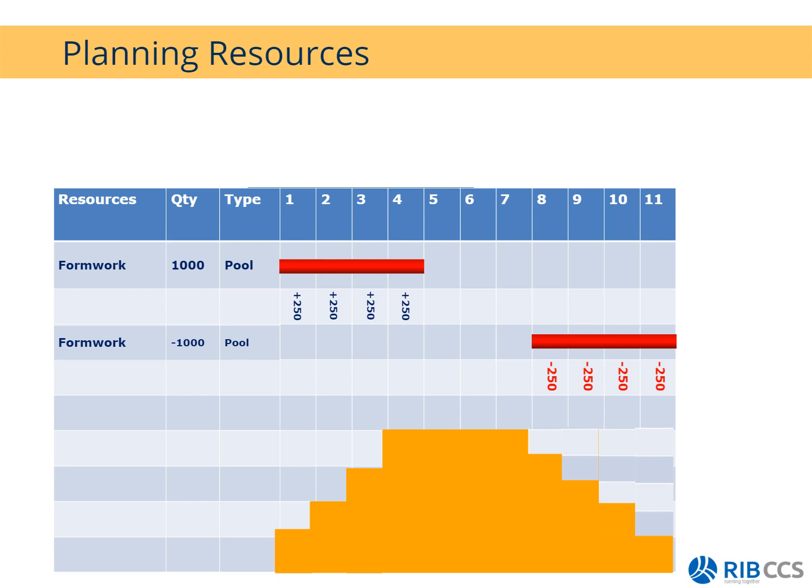That means if you draw up your histogram, it should be in a step form like this. You start off with 250, going up to 1,000, and then at the end of it, you should be left with nothing, meaning that in theory, it should be returned to the pool. This is also a nice way to double check your temporary material, because I know of a lot of sites who've run at a loss when it comes to things like your formwork and scaffolding and so forth.